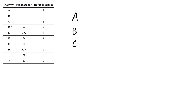Moving on to the next activity, activity D depends on A, so we just draw an arrow going from activity A to activity D. When we look at activity E, it depends on B and C, so B and C both have to lead into this one — we draw two arrows going from B and C into E. Activity F depends only on D, so we have one single arrow going from activity D to activity F.